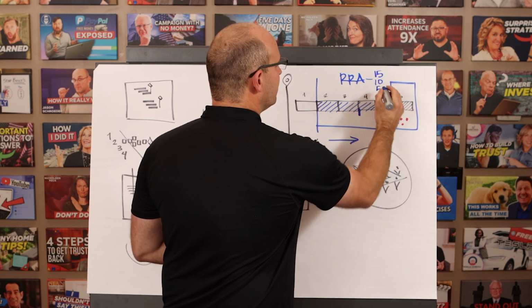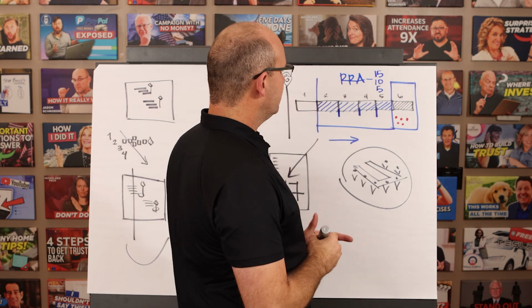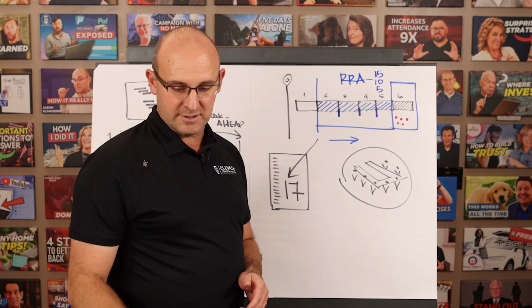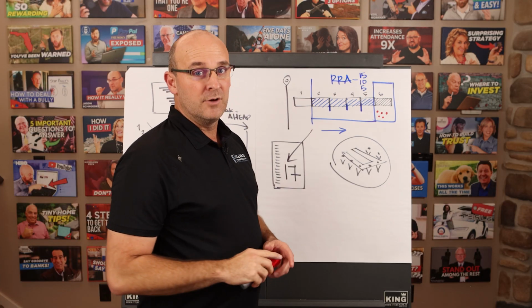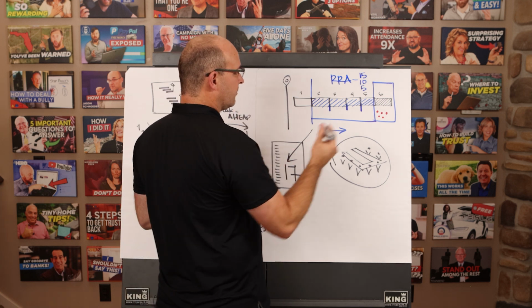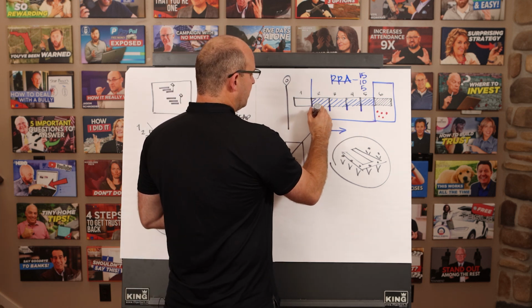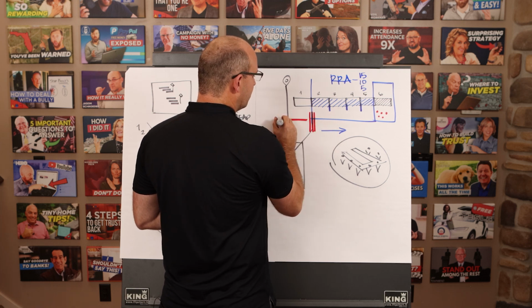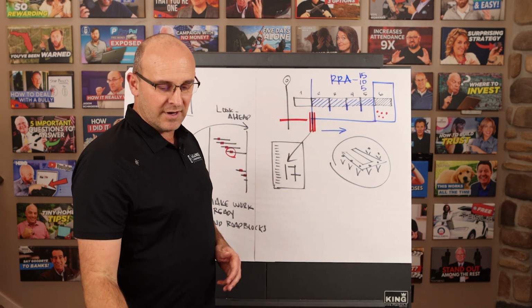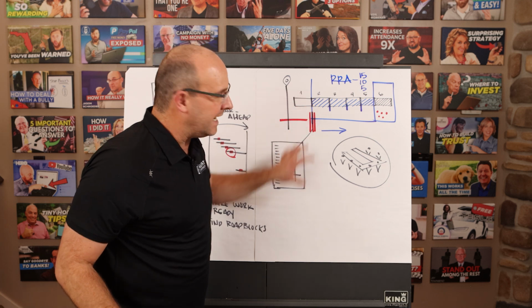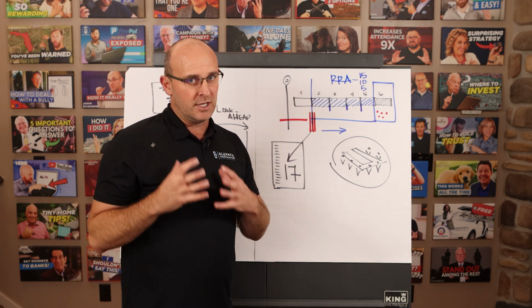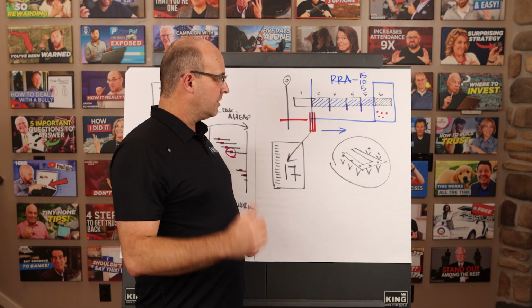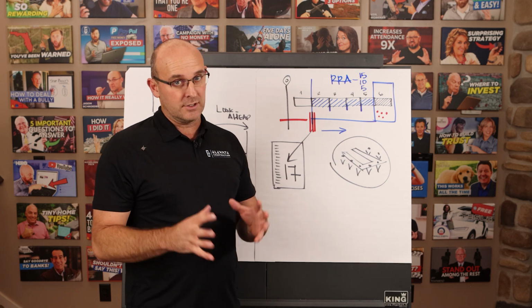If you had a roadblock removal average of 5, then you're getting rid of roadblocks about 5 days before impact. The problem is most companies have a roadblock removal average of +1, 0, -1, or even in the minus category. That means they're finding and removing roadblocks too late, and that means you're not looking ahead, and that means we're not using the look ahead process.